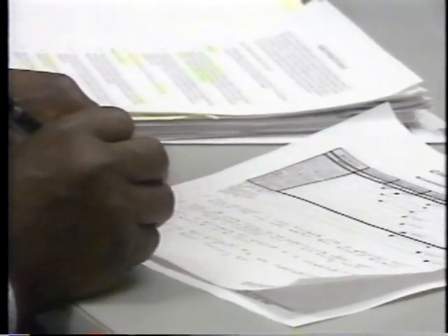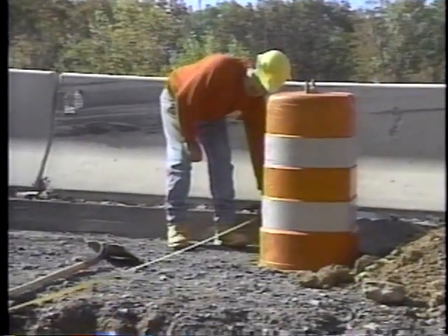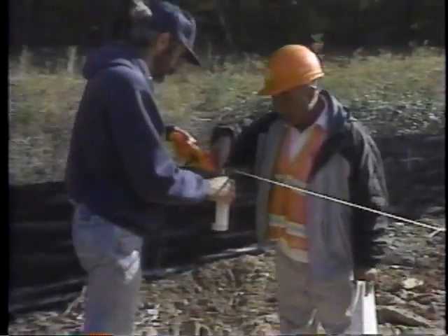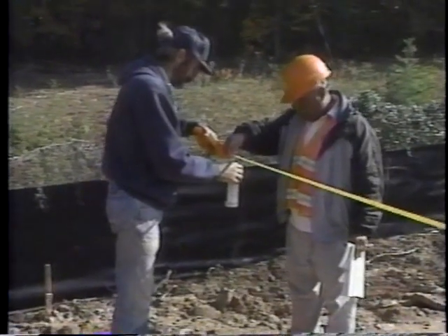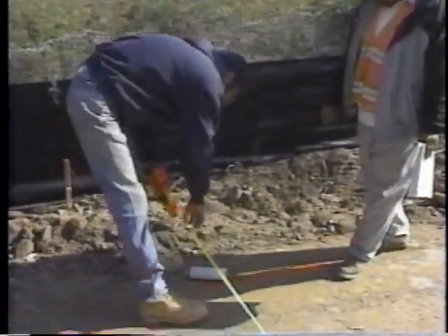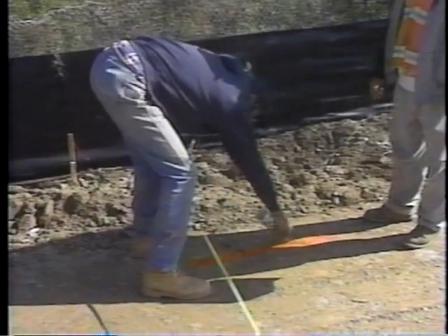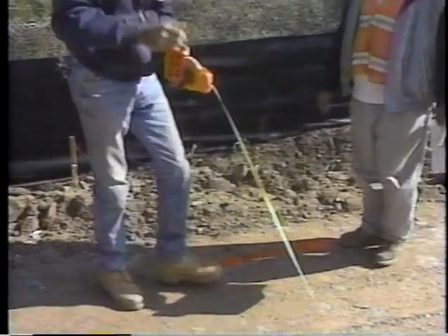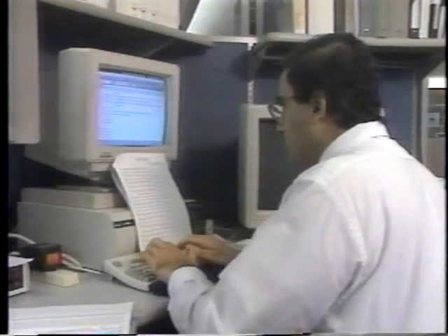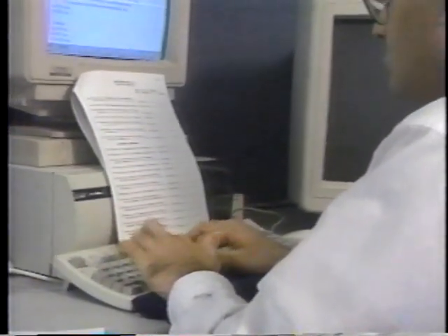Contract assignments, which are never performed by field construction personnel, should be omitted. Examples include the survey crew, if staking is done by the contractor, plant inspectors, when certified plants are used, and density and gradation inspectors, when the tests are performed by district personnel. The many different contract situations make it difficult to establish effective and meaningful minimum staffing guidelines.